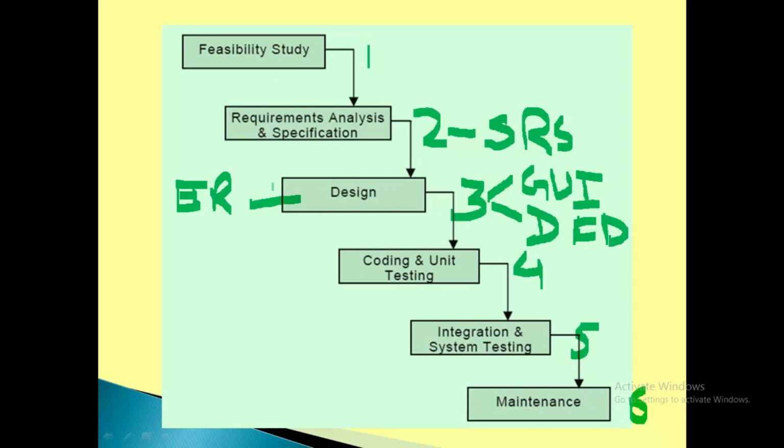Design phase in itself is very much important to be understood in detail while studying the system analysis and designing subject also. Again, before we go for the designing, it is very much important to complete the requirement analysis and specification phase. And before we go for step 2, which is requirements analysis and specification phase, we have to complete the feasibility study first. Until the first phase is not totally complete and the project plan is not ready, is not delivered in the form of a written document, nobody can go with the start of requirements analysis and specification phase.